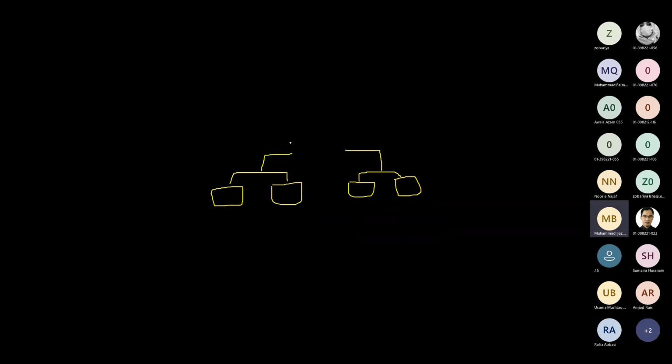Okay, fine. So generally speaking, we say that when we roll up the WBS elements, right? For example, if I combine these two elements and these two elements, these four elements combined together should deliver me this thing 100% complete. Nothing less, nothing more.